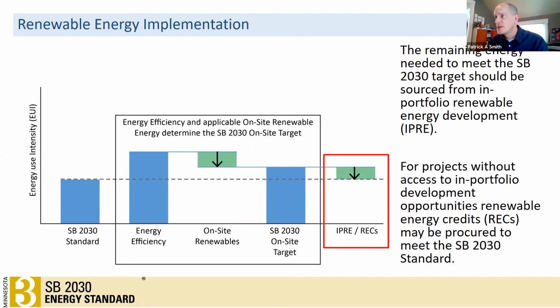The question was, what resources or data informs the 12-year simple payback period calculations? You'd be looking at typical utility rates in a market, which would help you calculate the savings, and then looking at the cost data either from our baseline cost model that we have loaded into our energy standard tool, or pricing from a contractor.